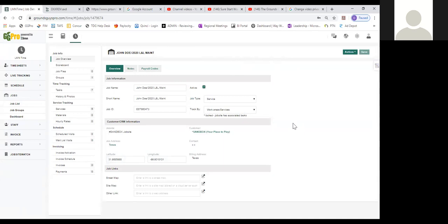This is just for the guys, just so they know. Let me use an example. For mulch, if I said it was a 10-yard job, then I link my mulch materials. When they clock into mulch install and clock out, a pop-up comes up and says how much mulch did you install. It's going to say a 2 cubic foot bag, a 3 cubic foot bag, or yards. They check the one that applies, and then they type in their quantity.